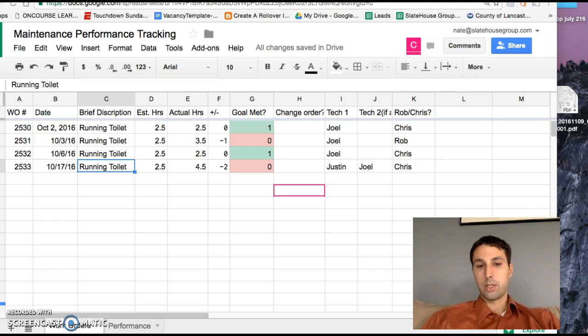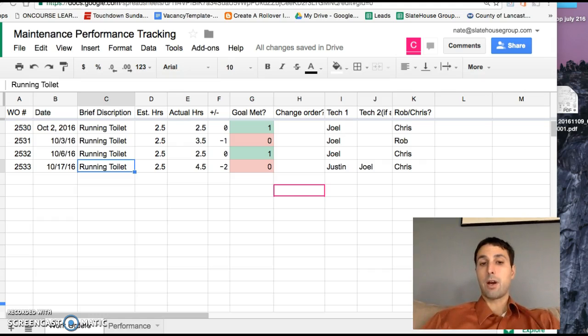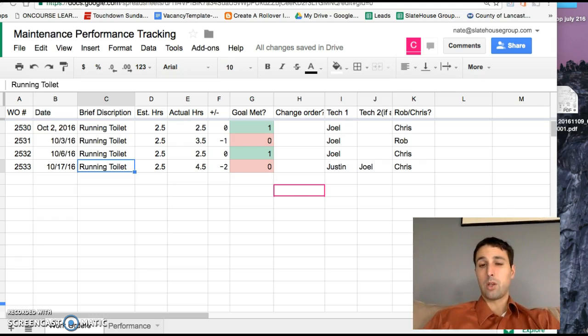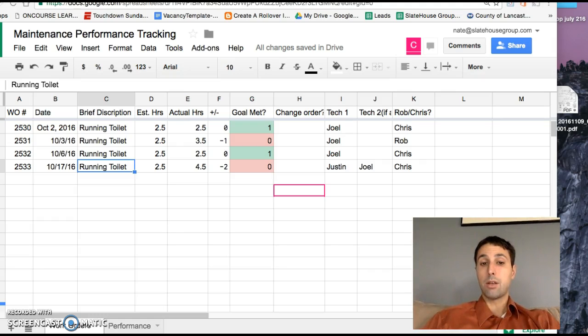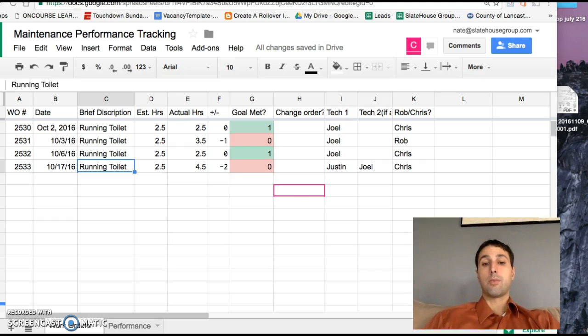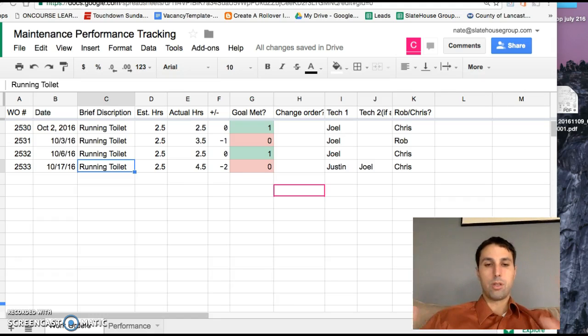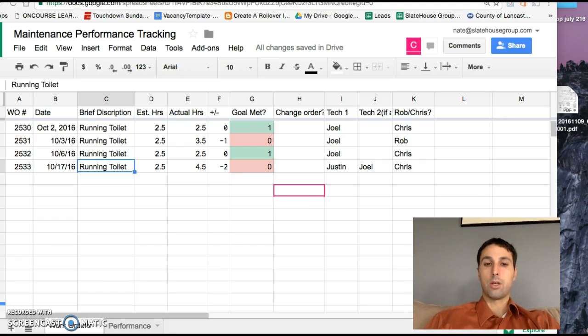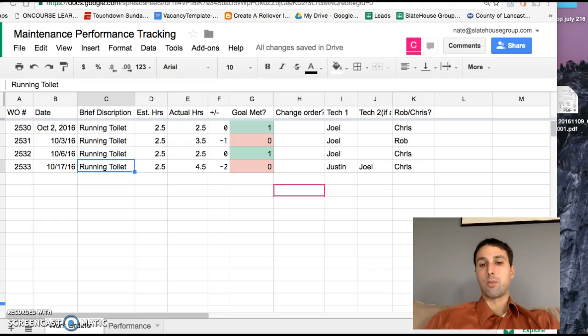So you go out to fix the toilet, it says three hours to fix. That's how long it should take you to fix it. If you take three and a half hours, no one's going to be mad or upset but those are things that we're going to be taking a look at. If you go out there and you think it's going to take three hours, or we say it's going to take three and it actually takes ten, that's a problem and that's something you should get out there and call us right away and say hey look, Rob, Chris you didn't quite get a full picture of what this is, let's get a change order, let's let the owner know that it's going to be a little more expensive than what we thought. As opposed to just doing it, taking three times as long for good reason but then surprising everyone when the bill comes in.